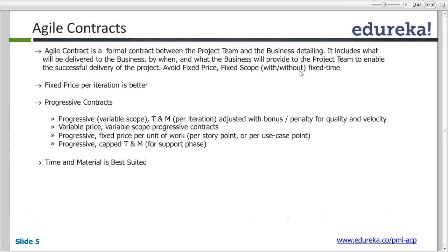So in Agile projects, fixed price and FSFT should be avoided. One of the best approaches recommended is fixed price per iteration. In Agile, the size of an iteration remains fixed. If at the beginning of the project the iteration size is decided to be three weeks or four weeks, no matter what, the iteration size does not increase. Depending upon the situation, we might choose to drop or pick up additional stories, but the size of the iteration would not increase — this is irrespective of the stories or features delivered.